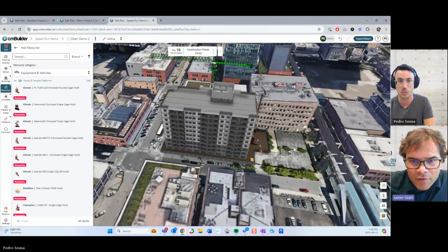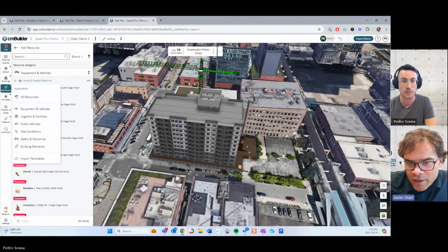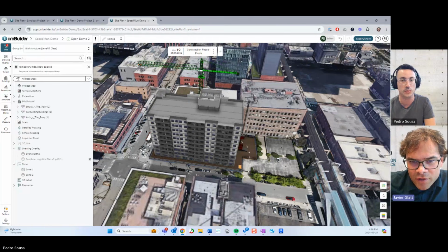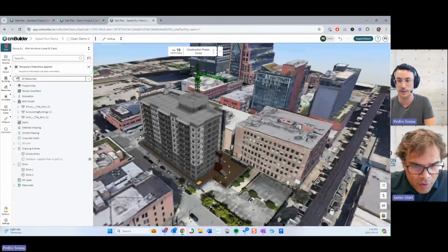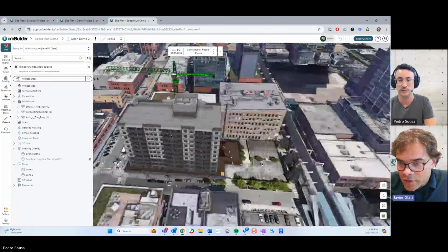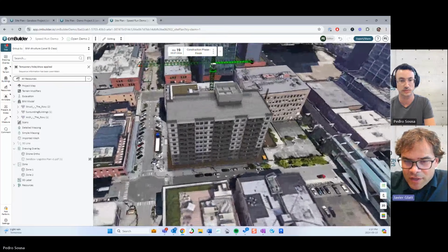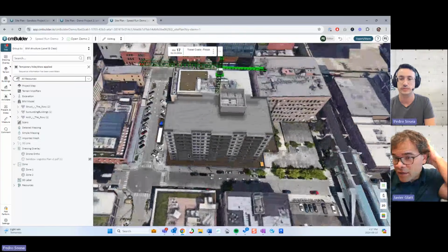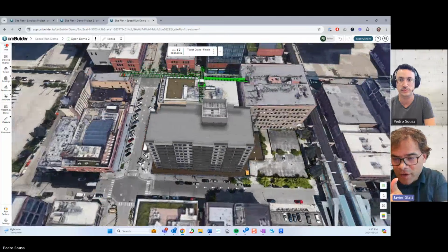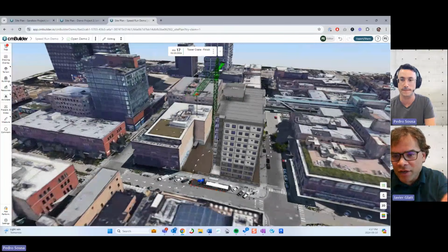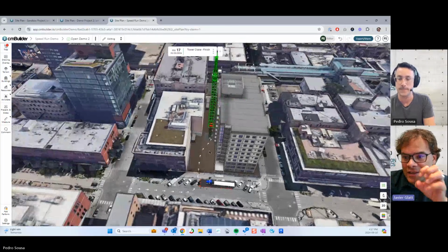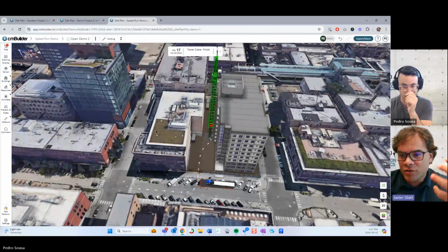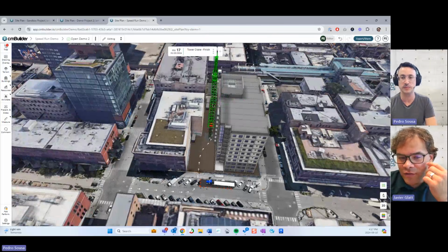I think you talked about coverage, resource coverage envelope, where the crane is, or sorry, the hoist is relative to the crane, lay down areas, boneyards, storage, no-fly zones. These are all the types of things that you can easily communicate. You know, where you can swing the crane here, we can't swing the crane there. And I'm going to talk later about how you start to put that contextual information into a presentation or into a final deliverable to make it easier for the customer.